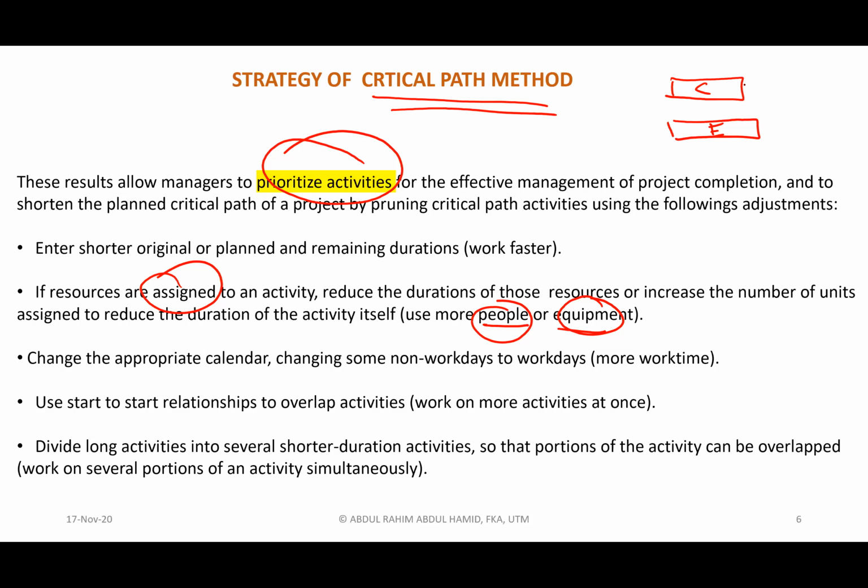Where should we prioritize? If E is the critical activity, and C has some extra time that we can delay a little bit in terms of starting and ending, then the resources are to be put first on E. Only later will they come back to complete C. That is the concept of prioritizing.